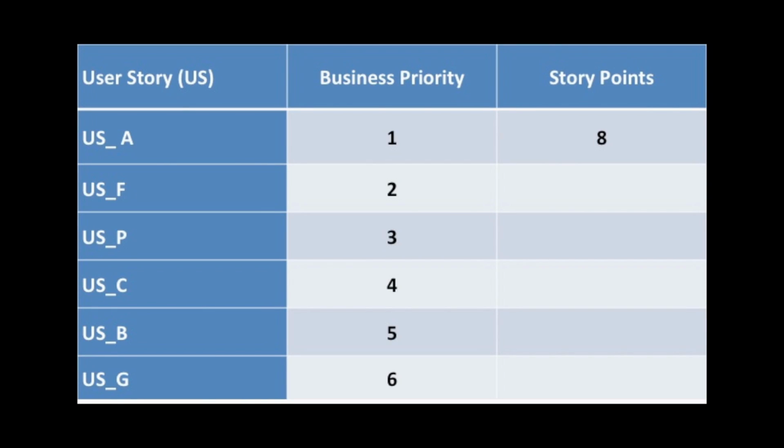The product owner is responsible for creating and maintaining the product backlog item. The goal of product backlog grooming is to review all the PBIs and rank them so that they can be consumed by the sprint teams. A form as shown below is used to record product backlog grooming.